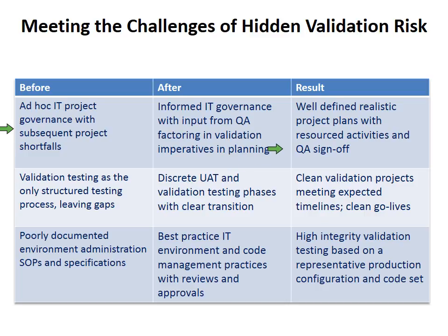You don't have any chance if at the beginning of the project's inception and conceptualization you didn't have a compliance component being factored in, and a realistic schedule for what it takes to really think through a validation, if the system is characterized well enough to be able to do that. And if you improve on that, you'll have a much more realistic project plan and activities, both IT and compliance activities, that are going to make sense for the risk, scope, and nature of the project you're taking on. If you're outsourcing it, then you need even more time to figure out all of the issues related to that if you haven't already done that.